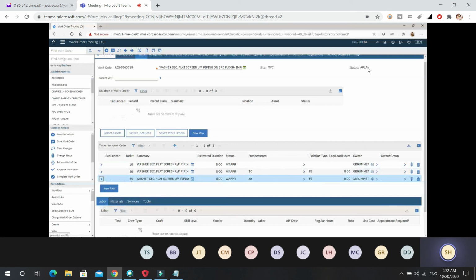And that happens a lot because maybe we don't have the circuit available. We can only do it on Monday, Wednesday, and Friday for some reason. Maybe the crew's doing something else on Tuesday and Thursday, and it's okay to leave whatever this is down while you skip Tuesday and go to Wednesday. So that's what the lag does. The lag tells the system how far to move from task to task. Does that make sense?